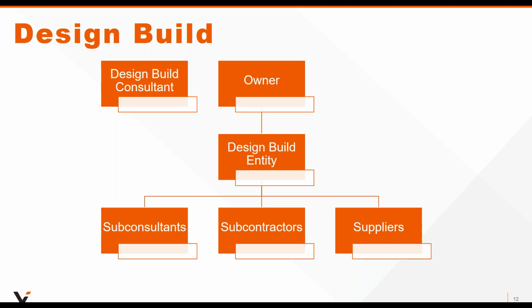The downside is that the owner risks losing control of the actual design solution, because the advantage of fast tracking is that you're giving elements of design control to the design build entity. And the other downside is that obviously there are claims that may happen between the design firm and the contractor.